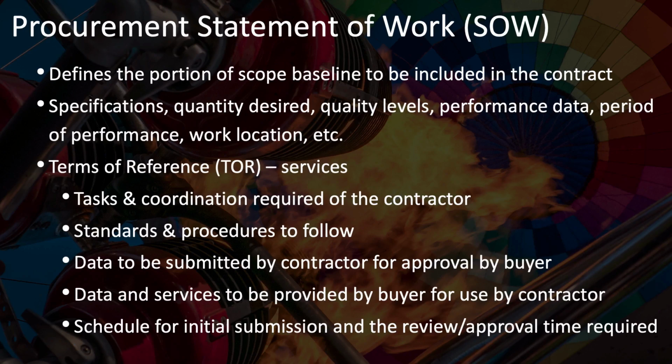Terms of reference is a term that is sometimes used when contracting for services. Though terms of reference are more commonly used, more like a project charter, for things like research studies or investigations or committees. In the context of procurement, it can serve essentially the same purpose as a statement of work.